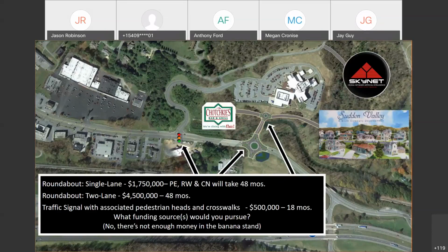and issue the results. Yeah, I think not surprising. We saw most of the focus going to Smart Scale and revenue sharing. Smart Scale simply because of the size. That's $6 million. It's really close to that sweet spot that Anthony talked about in that $5 to $10 million range. I believe it was 90% of the projects that got funded in Smart Scale fit one of those two ranges.